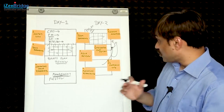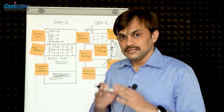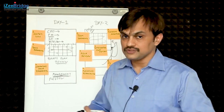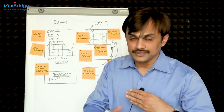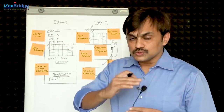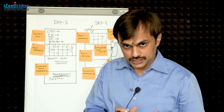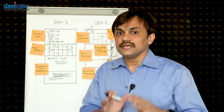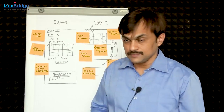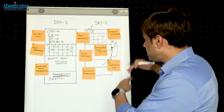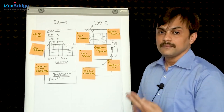You might be wondering there are too many cross-checks and confidence checking. The idea here is this is an event which is giving direction to multiple Agile teams forming an Agile release train, and we wish to do these kinds of events once in a PI with around a 10-week gap between events. Between these two events, we want to make sure we provide sufficient visibility and direction to the Agile teams so they can do their decentralized decision making and integrate and align well with other teams. So we do integrated plan review, we do risk reviews, we take a confidence vote, and if something is missing, we end up doing rework to come up with a workable PI plan.